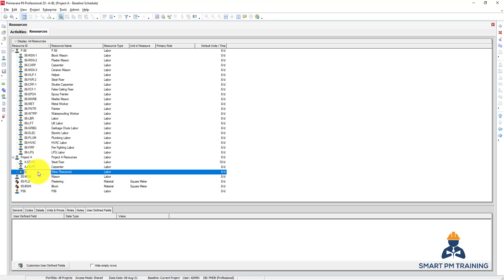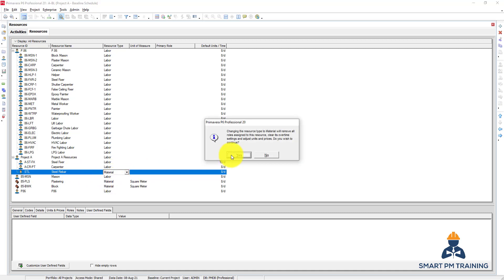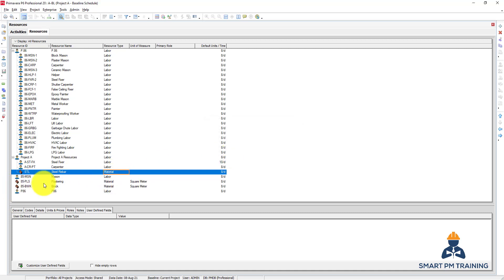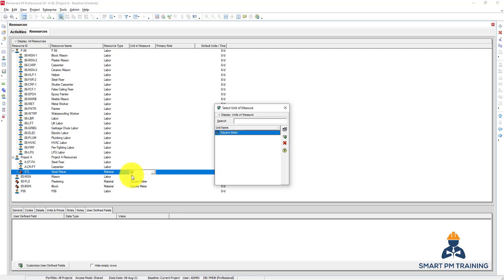It's steel. Okay, and I can also choose the unit. So for steel rebar, I want to have a ton.